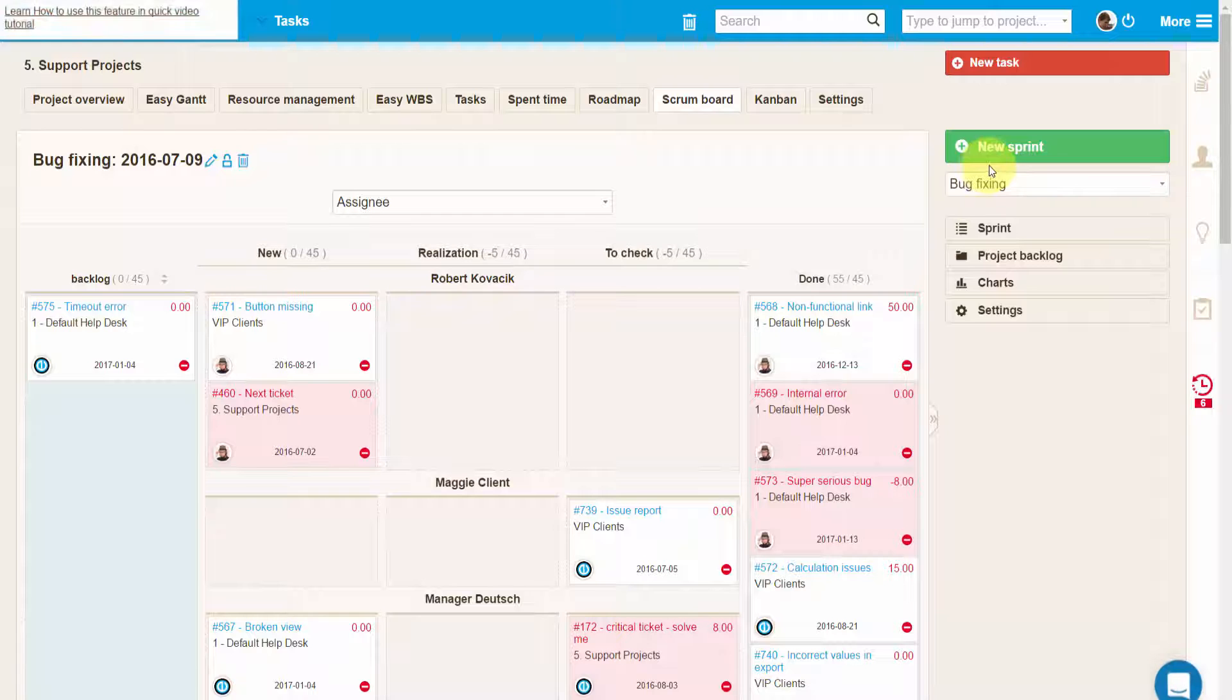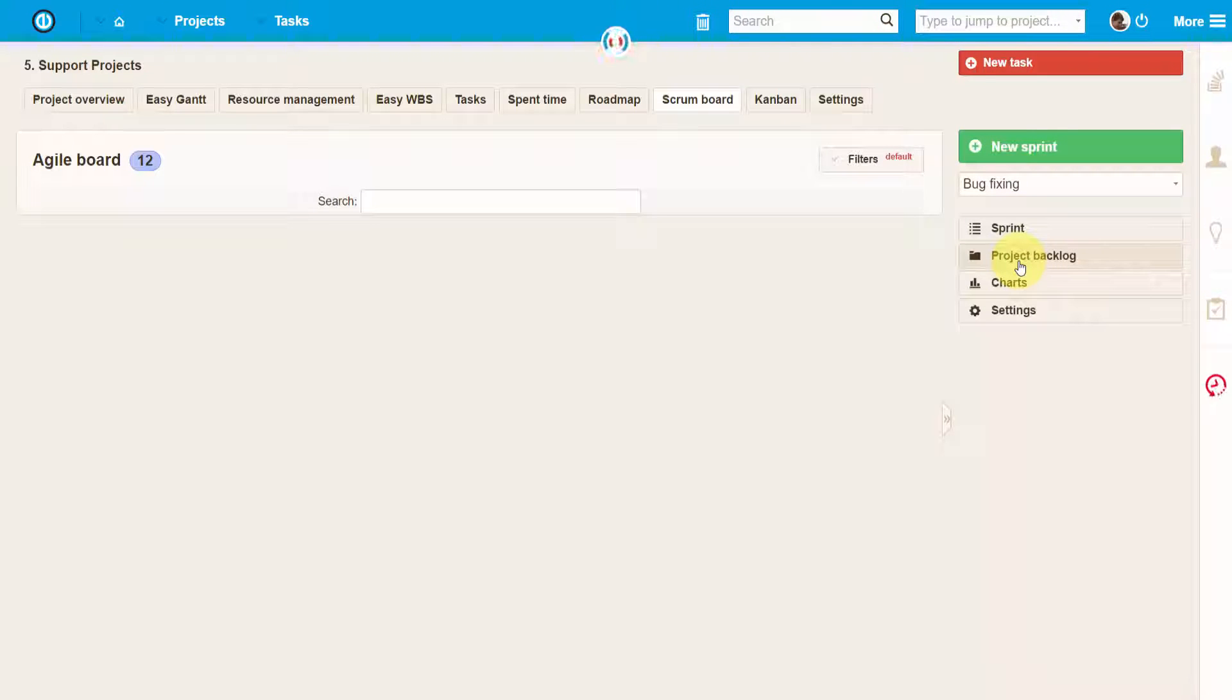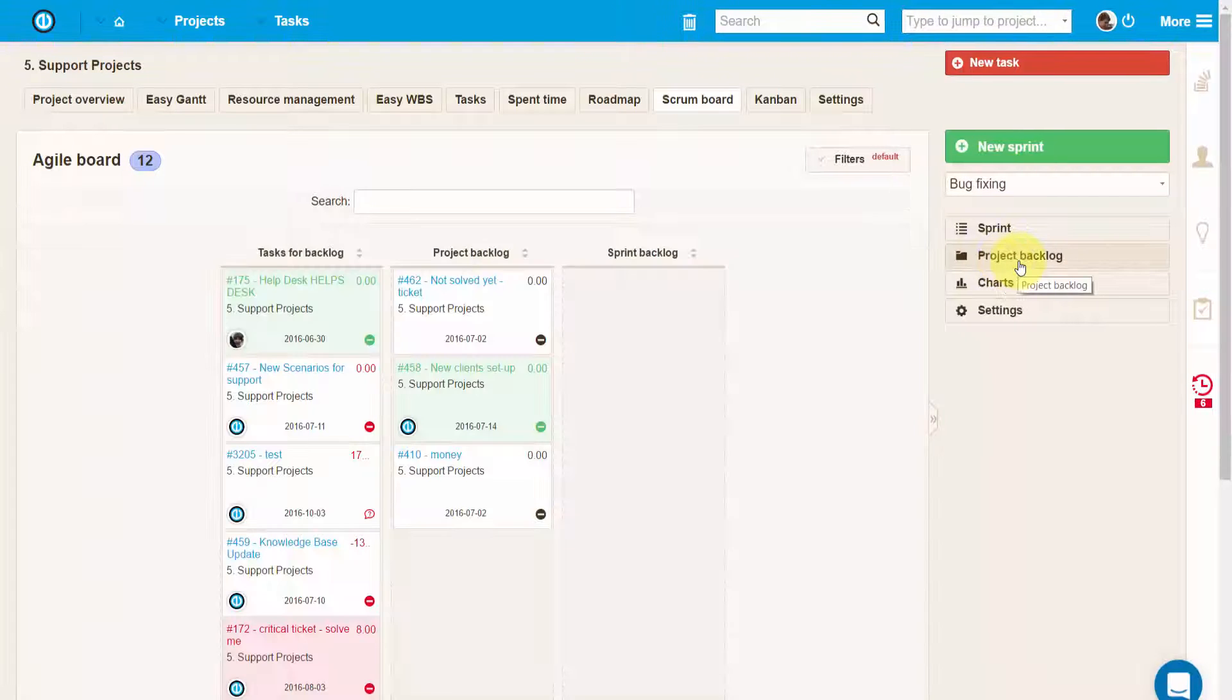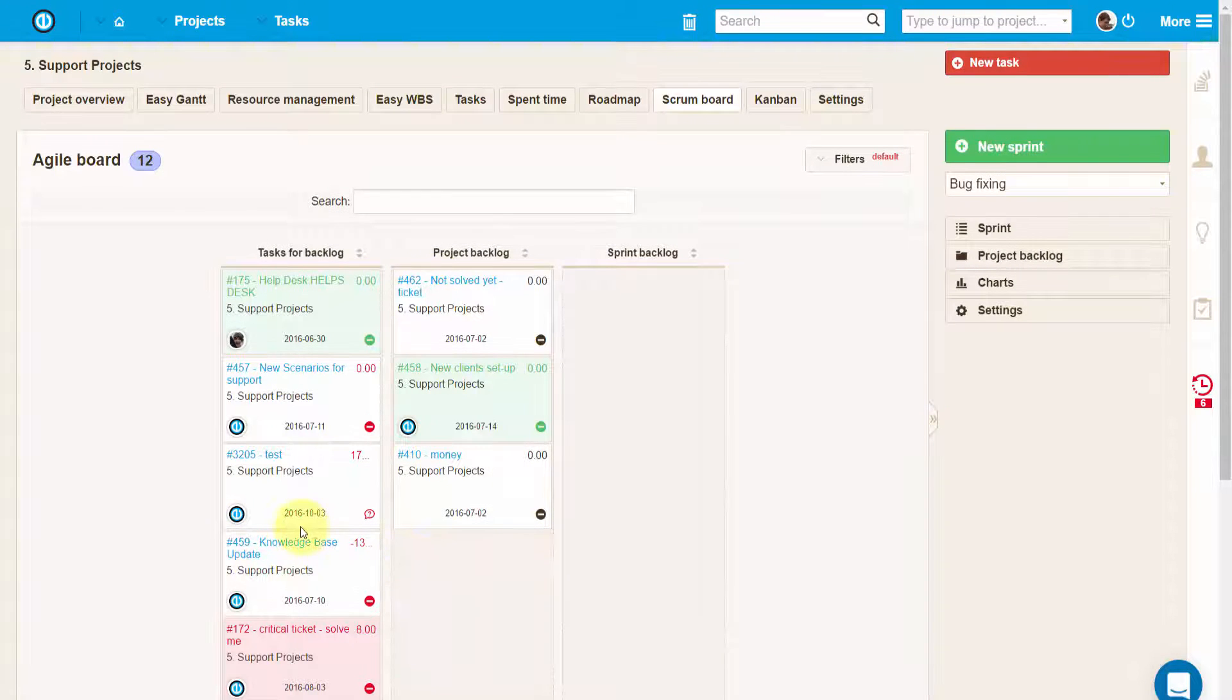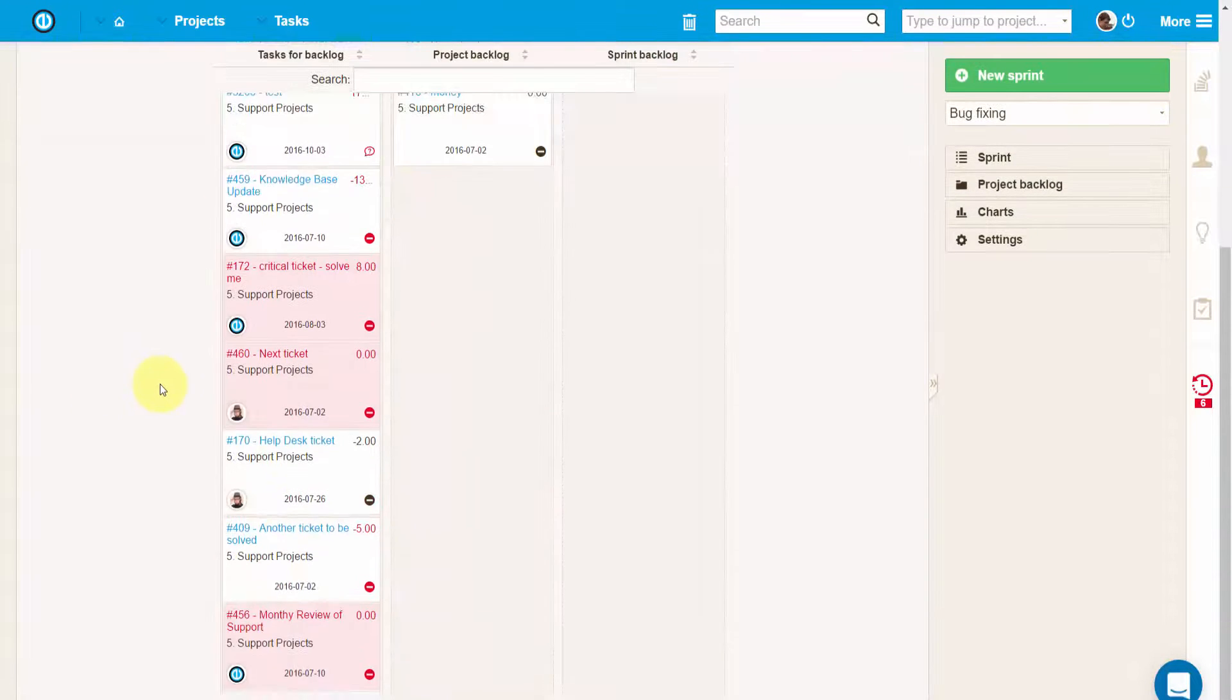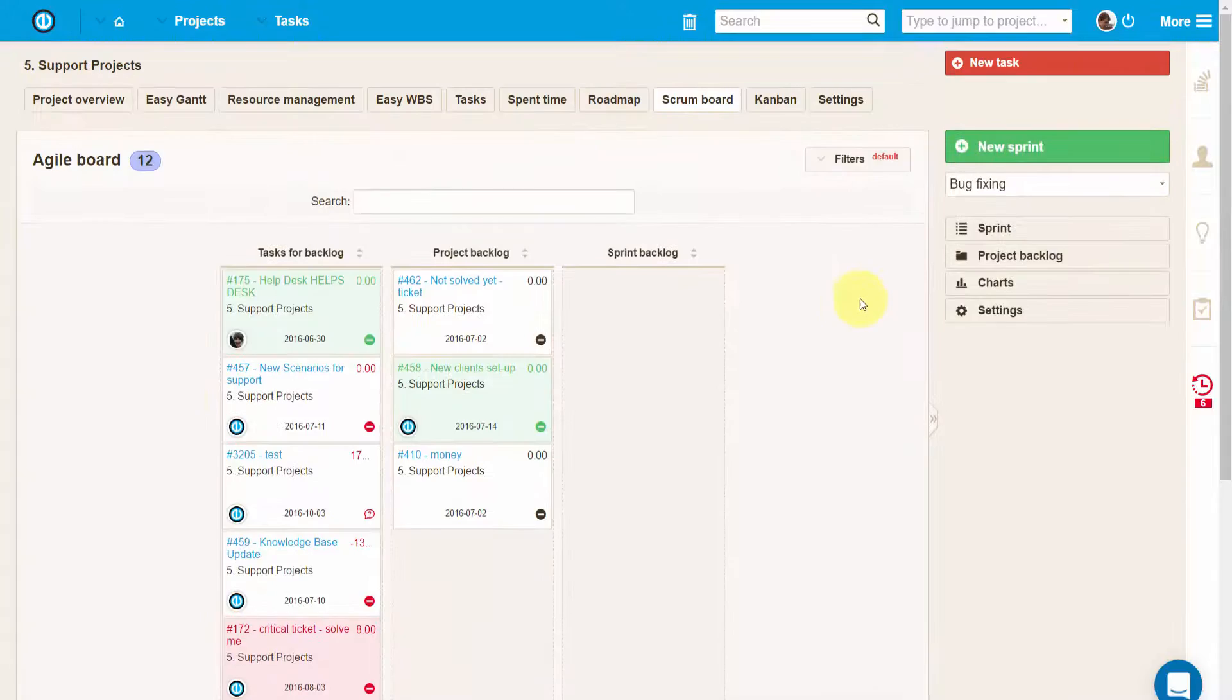The project backlog button allows you to select which of the tasks are relevant for the agile processing and manually set the order at which you prefer them to be moved to the sprint backlog like here.